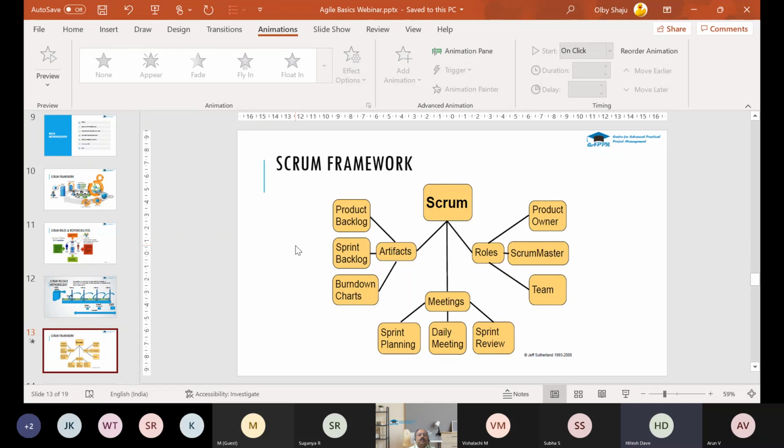Obviously, there is a possibility that we can add more resources to that sprint to cover the extra amount of work. It might not be, because based on the previous sprint you might have learned that you could not complete it. In predictive, you get the lessons learned at the end of the phase or the end of the project. But here, at the end of each sprint, you quickly get to know what mistake you are making and why you were not able to complete, and you correct that in the next sprint. So whatever you planned, you'll be able to complete. In most organizations, the first 3 sprints will not be normal. Everyone will be running here and there. From the 4th sprint, mostly it will run normally.